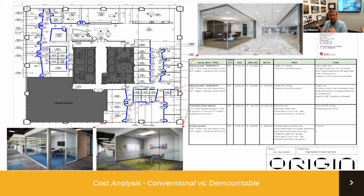We subsequently used it in Pipeline Tampa, and we're currently working with the client to test fit out two more spaces in the state. So this is a perfect example of how you can hold everything side by side, look at the pros and cons, and then, prior to entering into CDs and once the job's green lit, we're already fast tracking submittal packages and the products are available and on site way before we need them, and it doesn't hinder the schedule at all.